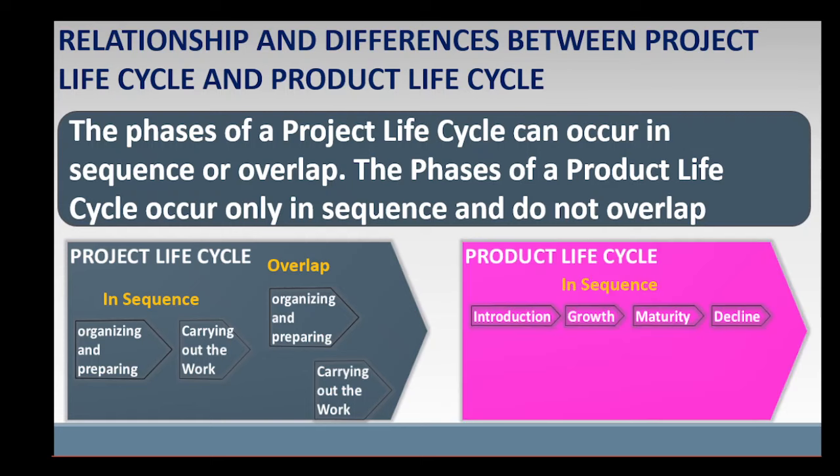The phases of a product life cycle occur only in sequence and do not overlap. In contrast, in a project life cycle, as you are organizing and preparing the work, you can also be carrying out some project work. During its product life cycle, a product such as a specific car cannot be in two phases, such as maturity phase and decline phase, at the same time.